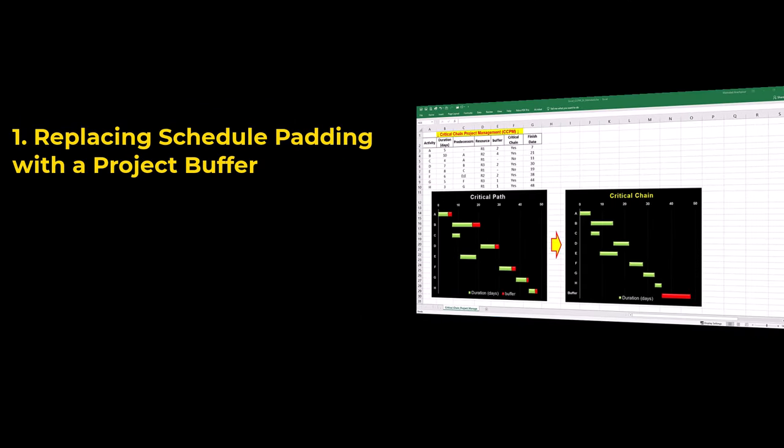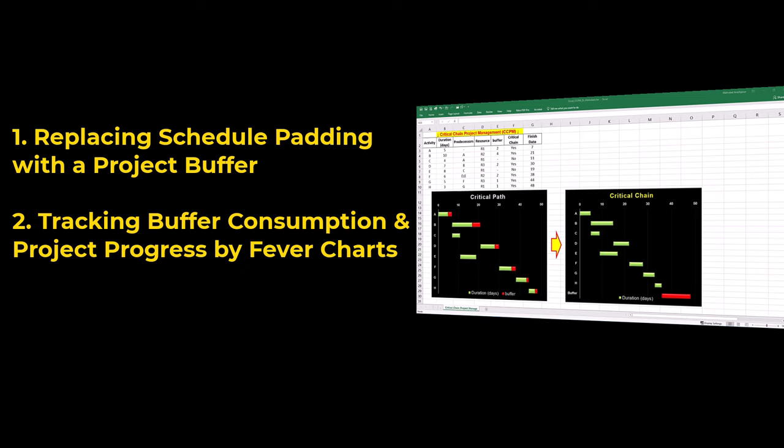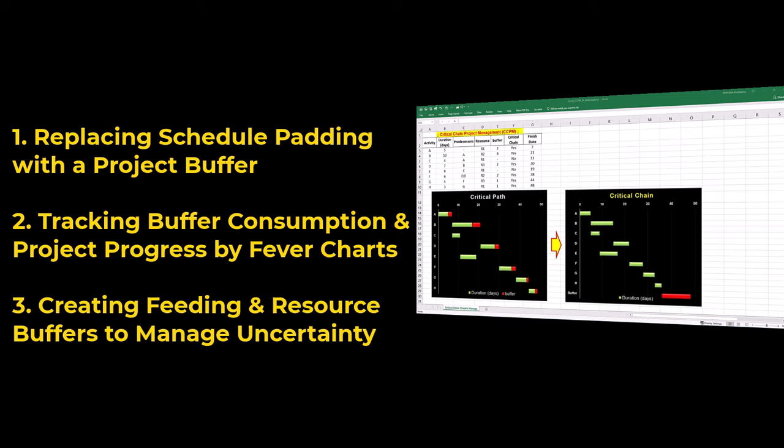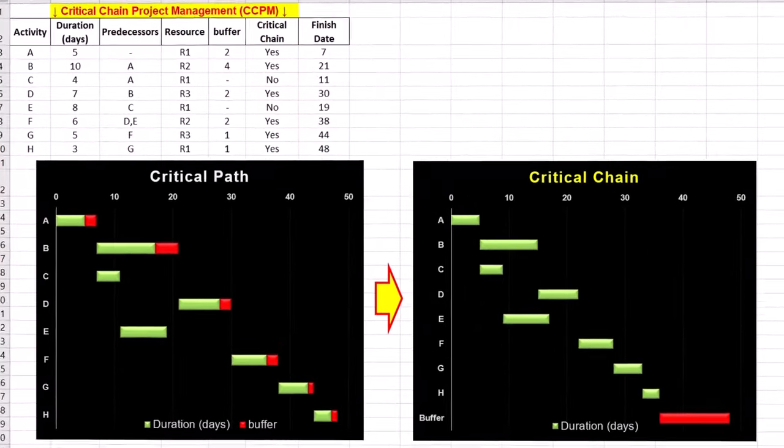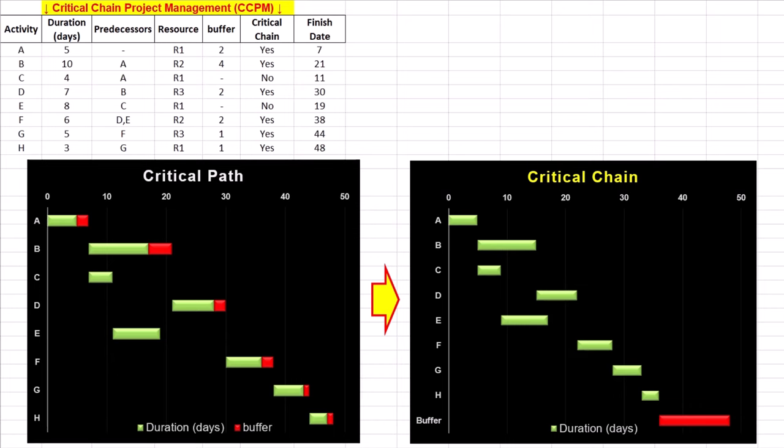Replacing scheduled padding with a project buffer, tracking buffer consumption and project progress by fever charts, and creating feeding and resource buffers to manage uncertainty. You can follow along by getting the Excel workbook by the provided link in the description below.